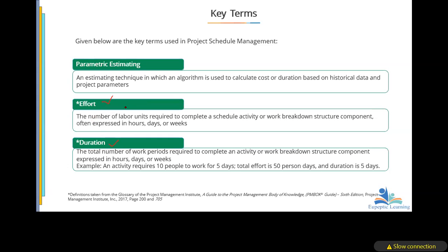What it means is that the activity itself has a duration of, let's say, 1 hour. But in terms of level of effort, because it took 5 people to do it, you multiply these 5 people by the number of hours, which is 1 hour. Have you seen it here? So the level of effort involved here is 5 times what? That will be 5 hours.